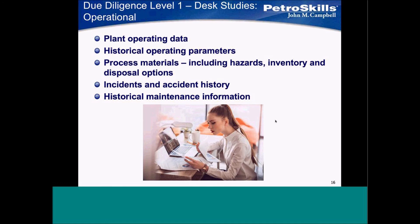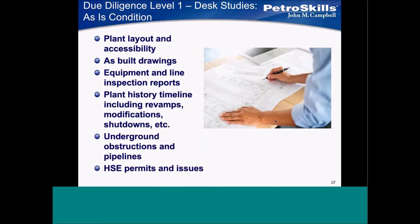Incident and accident history: if you're working in an area of the plant where there have been numerous events, that should tell you something. And the historical maintenance information — how has the unit been maintained? That gives you an idea of what you're going to find when you open it up. Also, inspection reports — what do they look like over the last five years? Has the vessel wall been thinning continuously? That would show you a trend. The idea is to gain as much intelligence about the unit you're going to work on before you ever do your design.